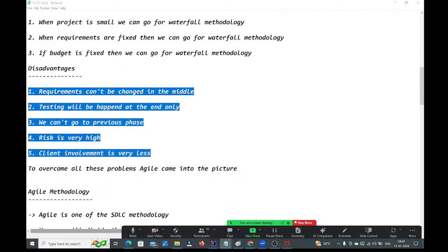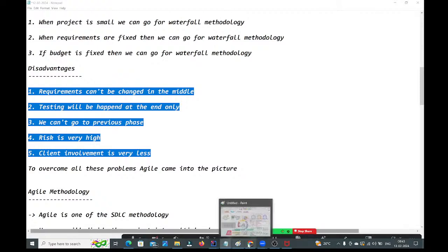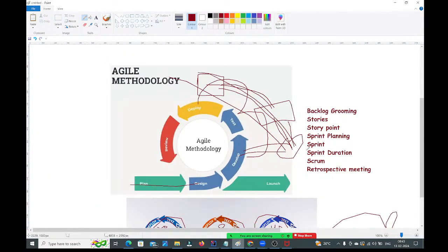I have a question. Please. For your sprint one, if after delivery or deployment your client comes back and says I need enhancement for what you deployed, do you include that enhancement in sprint two? Yes, correct. In the next sprint. Sprint one is already delivered and deployed. If the client suggests any enhancement, we create one new story in the next sprint, and we work on that enhancement in the next sprint.